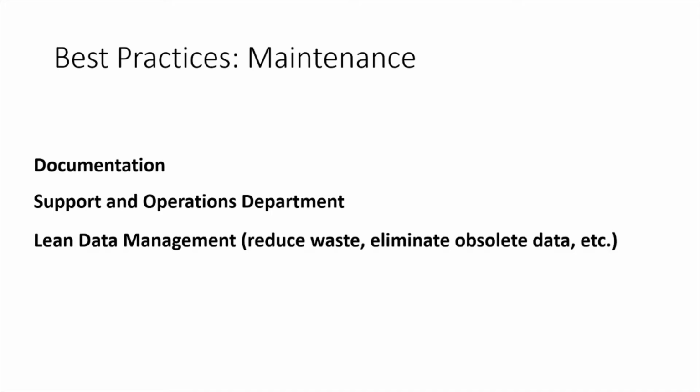Also, it's important what type of DevOps cycle you have, because usually we would have a long DevOps cycle, which means that we have a separate, external team that works on all the user requests, like a support or operations team. Or we have a short DevOps cycle, which means that we have some capacity allocated within the team, so we have some team members that handle all the user requests. Okay, so this could also be a good approach to use.